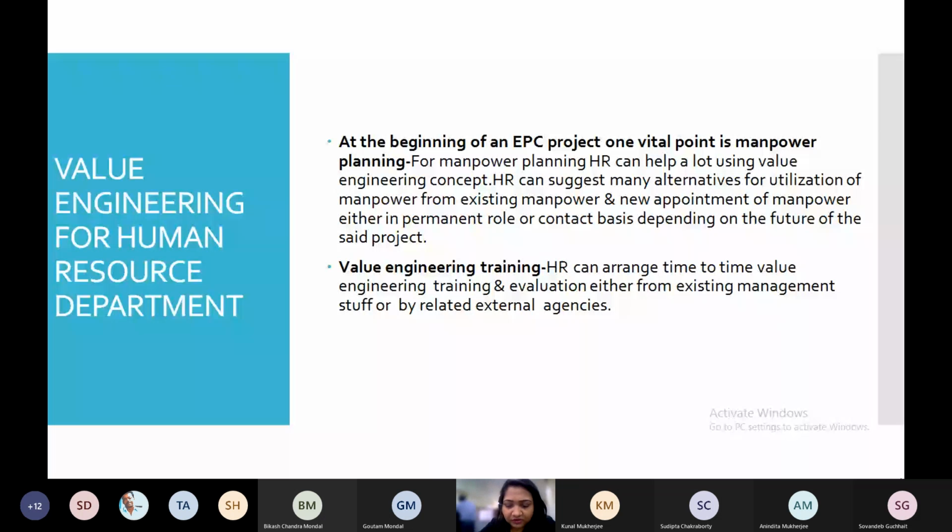So that is what demob is, no, sir? Demobilization is what they call it, correct. We sometimes plan that. It has also been found that permanent manpower is not always required. Depending on the future of the project, you can also hire on a contract basis. In that case, there will be a cost saving also. Okay, so it is a hire and fire model of employment. Correct. Yes, we do that a lot, sir.